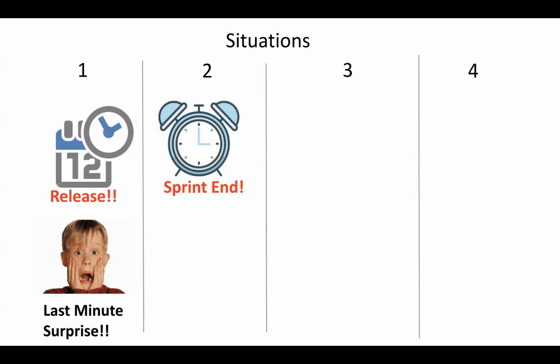In other words, you're not taking credit now, but you're taking credit later, because hopefully it'll get finished in the next sprint. You'll finish the third scenario because you've finished 2 of them already. Now, another option could be that you carve out another story for the remaining scope. For that third acceptance criteria, you can carve out a story just for that and send that to the product backlog.